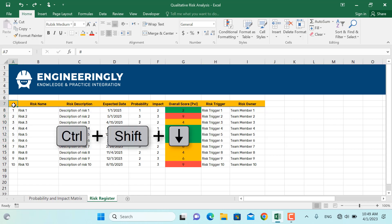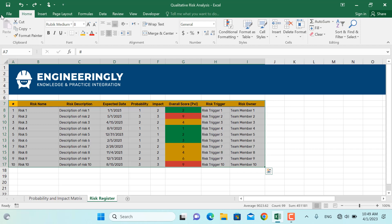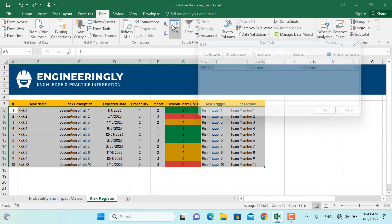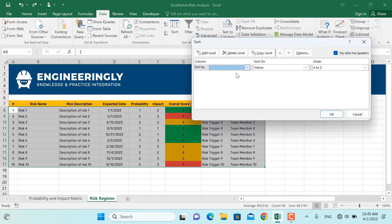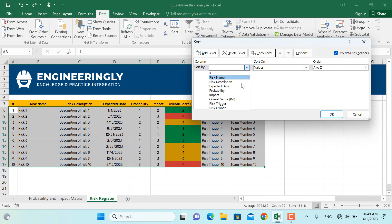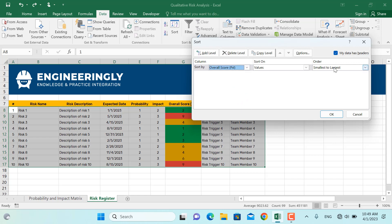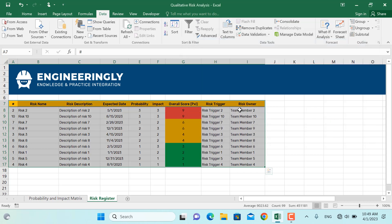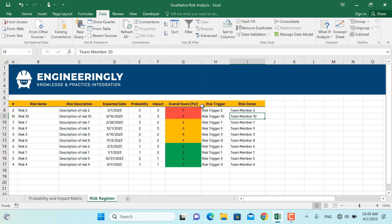I'll select the risk register list, go to Data, then Sort. I'll sort by the Overall Score, selecting it from the list and ordering from largest to smallest, then click OK. As you can see, the red ones are now at the top and the others are below. The previous order was based on the dates the risks were identified, while now the risks are sorted based on their priority and importance.